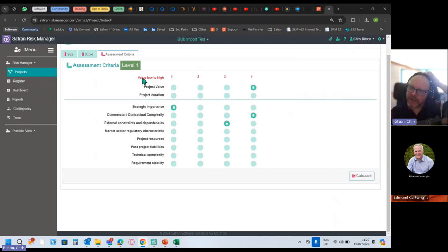It's an appropriate level of scoring system, but it also means you've learned something about how risky it is, and if it can be part of the 9 stable projects or the 1 basket case. Maybe we're going to make lots of money, maybe we're going to lose lots of money, we don't know. Kind of risk reward kind of scoring system. So you want to have a different scoring system for that, because you want to be more proactive with your risk management on such a project than compared to your bread and butter everyday projects.